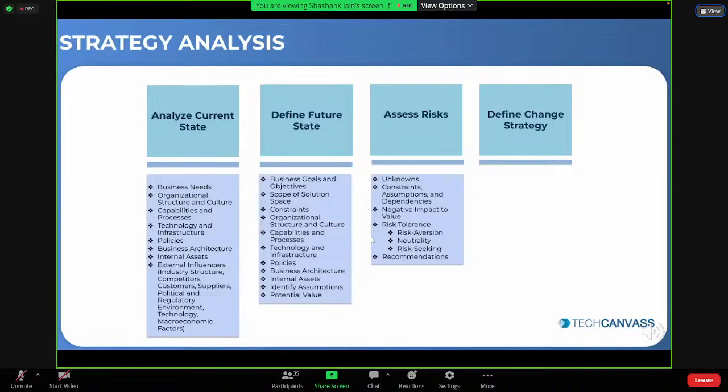What are the important techniques that can be used when it comes to assessing the risk? One of the important techniques is risk analysis and management. It is about identifying the risk, which you can do with the help of expert judgment, inputs from key stakeholders, experimentation, or by relying on past experiences or historical analysis. And you can prepare a risk register, which is about noting down the risk event or condition, what the consequence of it could be, what the probability of it happening is, and what the risk modification plan is. That's how you prepare the risk identification.